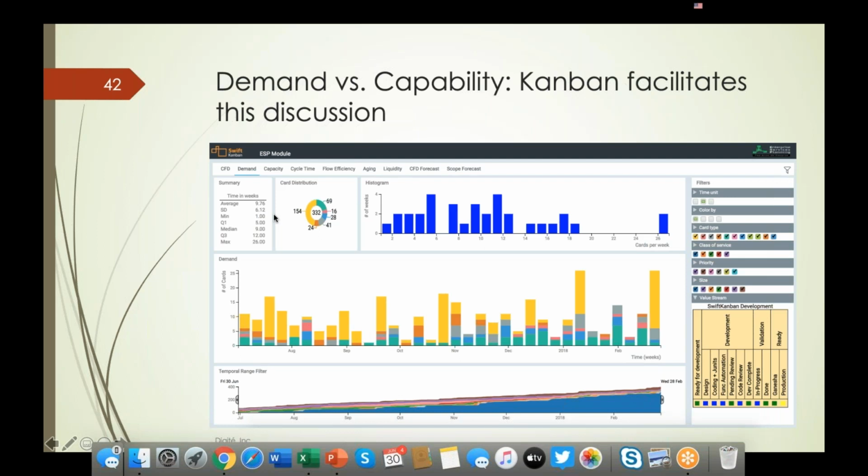So you can not only define a maximum WIP limit of how much work you can take on, but there is also an alert that lets you know that you have too low inflow of work. Most people laugh at that because in reality, most teams face the challenge of having too much work, and they never have the problem of too little work. But yes, such a situation is certainly possible.